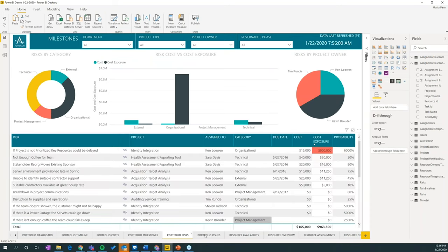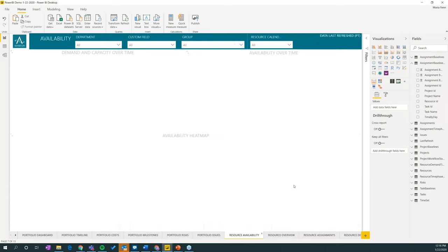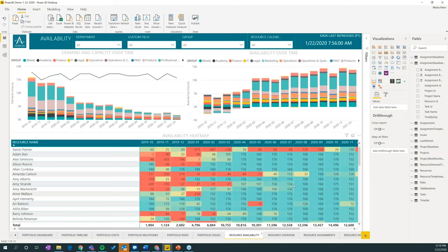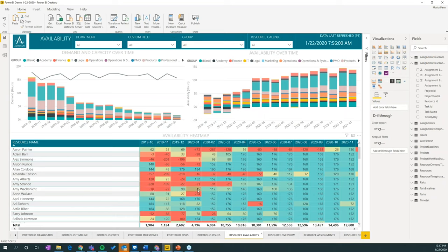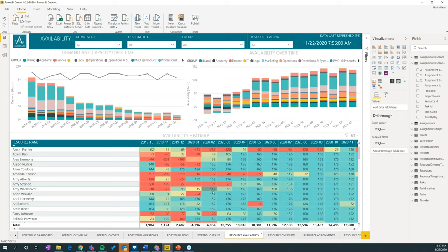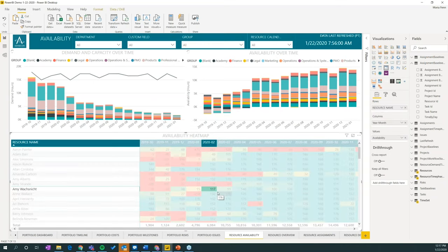Also included in these report packs, we've got portfolio risks. We could go all the way to resource availability. Resource availability is extremely useful because it gives you a heat map of who is over allocated when or who is under allocated. So you'll see it's separated by month and it goes back. We recommend with these reports going back about three months and then going ahead 12 months. So you can see right now, for example, Amy is over allocated by 10 hours in October. She this month has 15 additional hours available. So she is okay. She's got some extra hours there, but she's got only 15 more hours left to be planned for the month. But you can see next month, she's got 117 available.